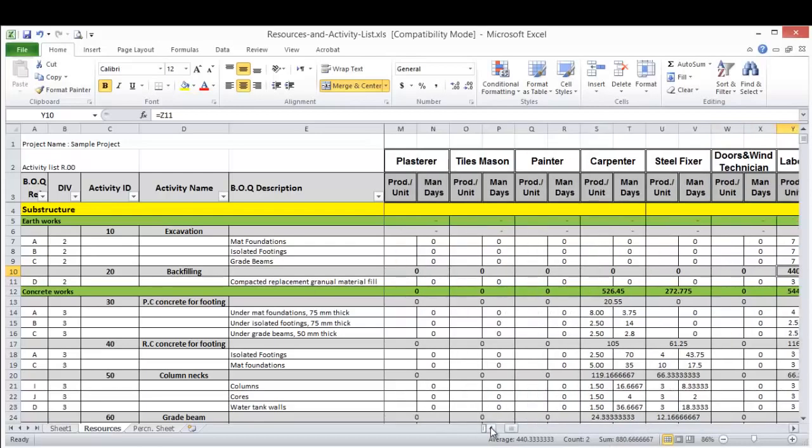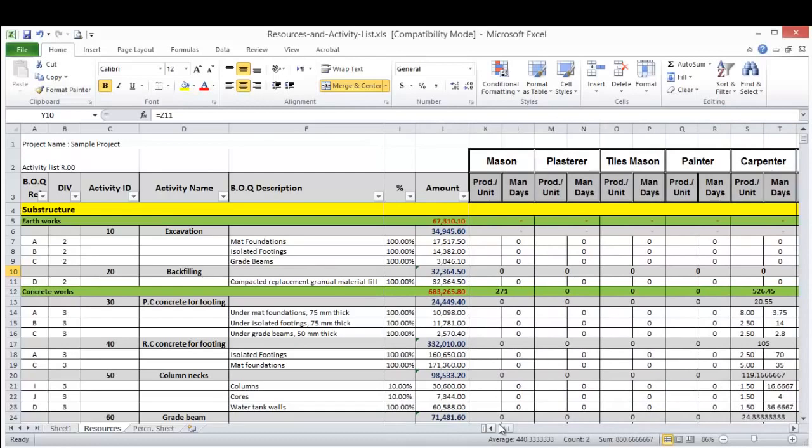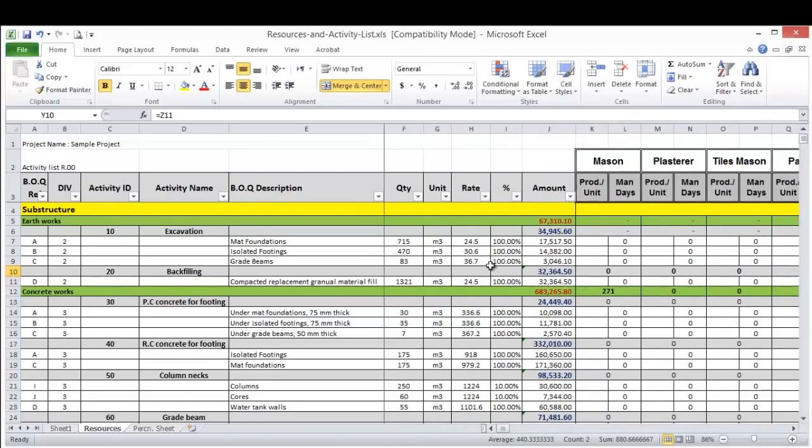Once you understand the formula, here in our formula we fixed the duration. So the duration is fixed and we have the quantity. Then we are calculating now the required total manpower to execute this quantity. And we will put this in Primavera. Then the Primavera will distribute this total manpower on the activity duration and will tell us how many daily manpower required.